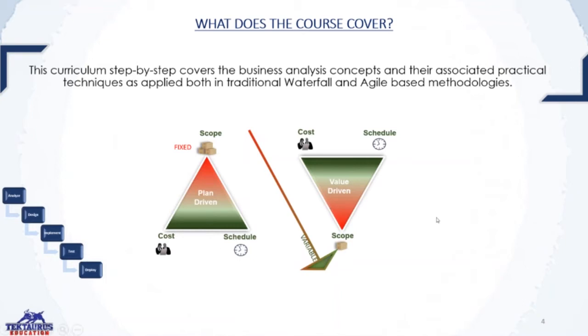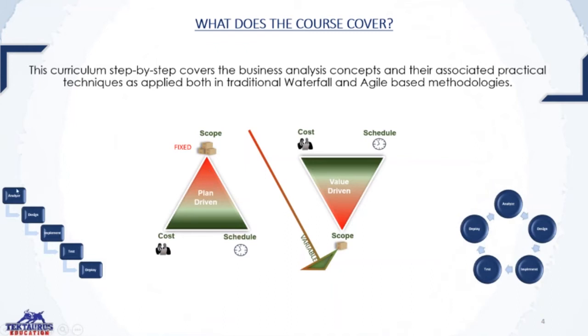So this slide is a little complicated, but essentially it is trying to summarize two little things for you. When we are in a waterfall methodology, we go from analysis to design to implementation to testing to deployment. These are different stages of the software development lifecycle. So SDLC is another term that we will be using, software development lifecycle. Software development generally happens in various phases. We do analysis, then we have to design our solution. Then obviously execution means implementation. What we have implemented, we are going to test it, and then we are going to deploy it to production, meaning release it. We are going to go through a release cycle.